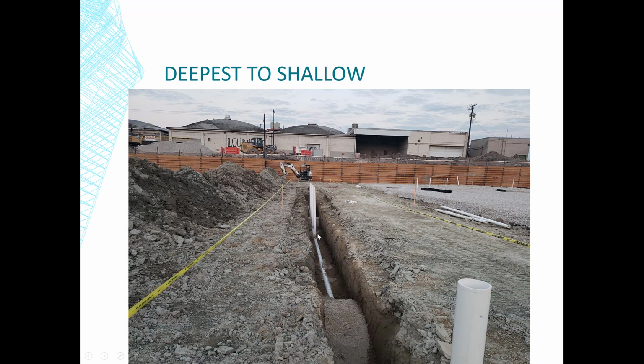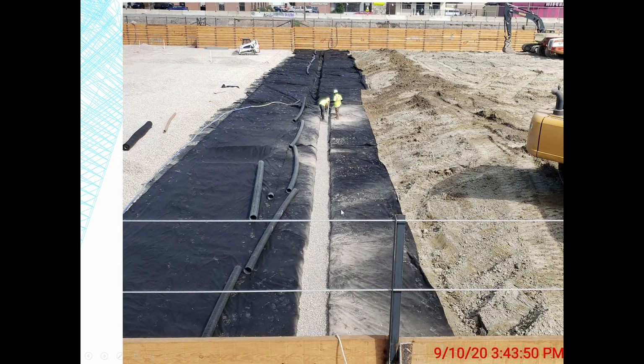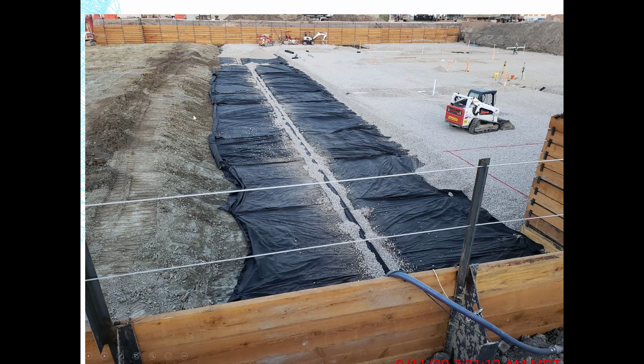So they've now done more plumbing to get to that point, excavate it out, go down, do some more, then do another section of this, bring the gravel over like you see in this photo, start to bury it, then they'll dig more, let the plumber go, put in another trench like this. It's just this process of moving dirt down to grade, getting the plumber in there,